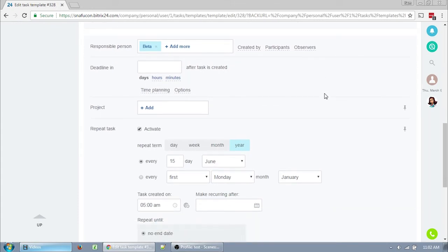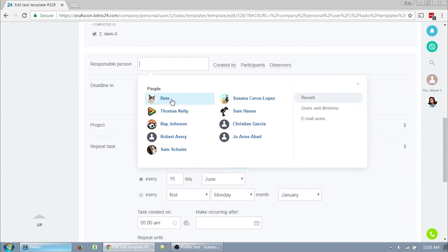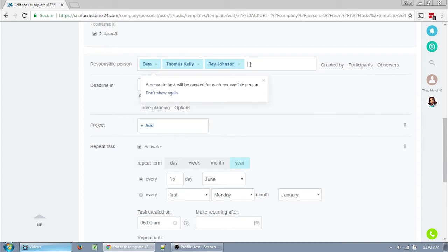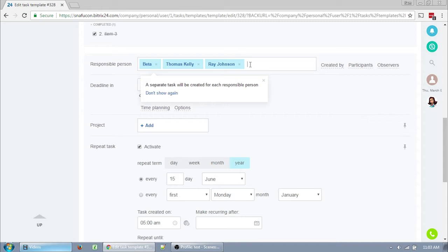The responsible person is exactly that. Is it you? Is it someone else? Who is responsible for the completion of this task? Most often it's going to be you, unless you're a manager assigning tasks to other people. There is only one responsible person per task entity. If you add two people here, the template will create two completely independent tasks that people will be separately responsible for. It does try to warn you that a separate task will be created for each responsible person, but I have seen times where this window just doesn't pop up. So just keep that in mind.